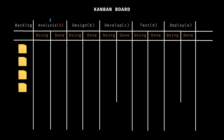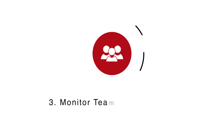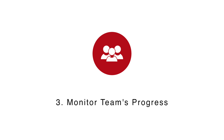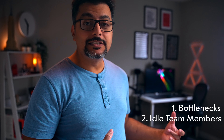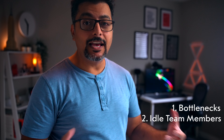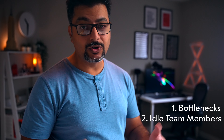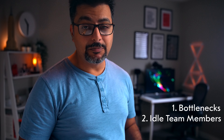This way, each person has at least one item to work on at any given time. It's not perfect, but it's a solid place to start. So our initial WIP limits are two for analysis, three for design, four for develop, three for test, and one for deployment. Step number three: once the team starts using the Kanban board, monitor their progress. Look for bottlenecks or idle team members and adjust the WIP limits as needed to ensure a smooth workflow and keep everyone engaged.